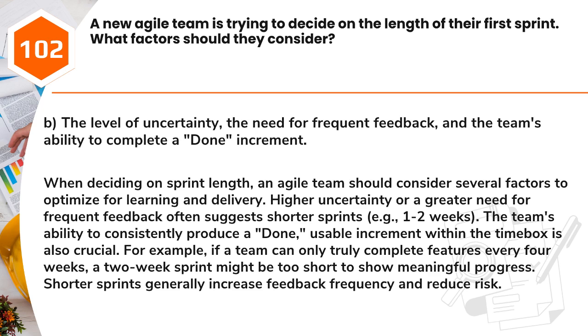For example, if a team can only truly complete features every 4 weeks, a 2-week sprint might be too short to show meaningful progress. Shorter sprints generally increase feedback frequency and reduce risk.